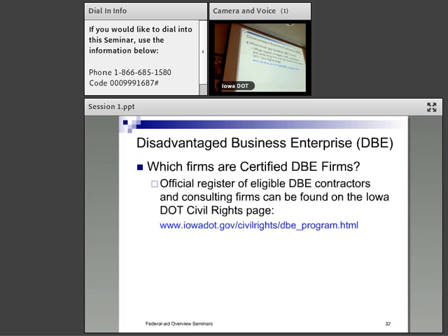So as a result, the spec was changed, and there's a specific dollar amount that is committed by the prime to the DBE subcontractor. And it's much easier to determine there's X number of dollars. If the contract was $133,000, it's a whole lot easier to figure out at the end, was the DBE paid $133,000 or were they not?